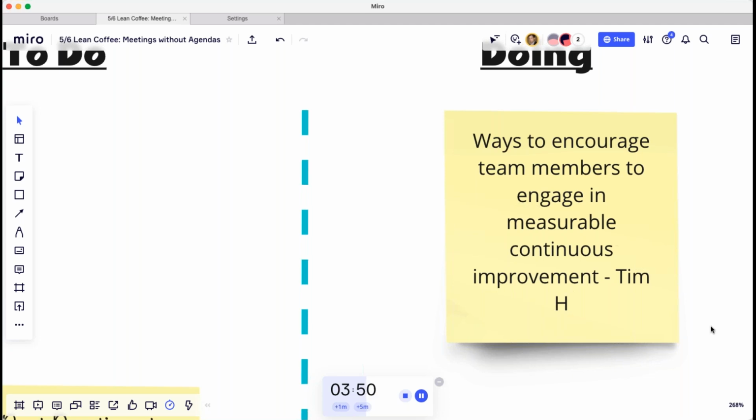I recently, a while back, took a class from Jeff Sutherland, and he talked about these continuous improvement ideas that you should do. He calls it scrumming the scrum, where you take these continuous improvement ideas and actually make them into a story, you task them, you come up with a goal, all of that kind of thing. So you treat it exactly like a story. At the end of the sprint, you demo it to your product owner to show them the value.